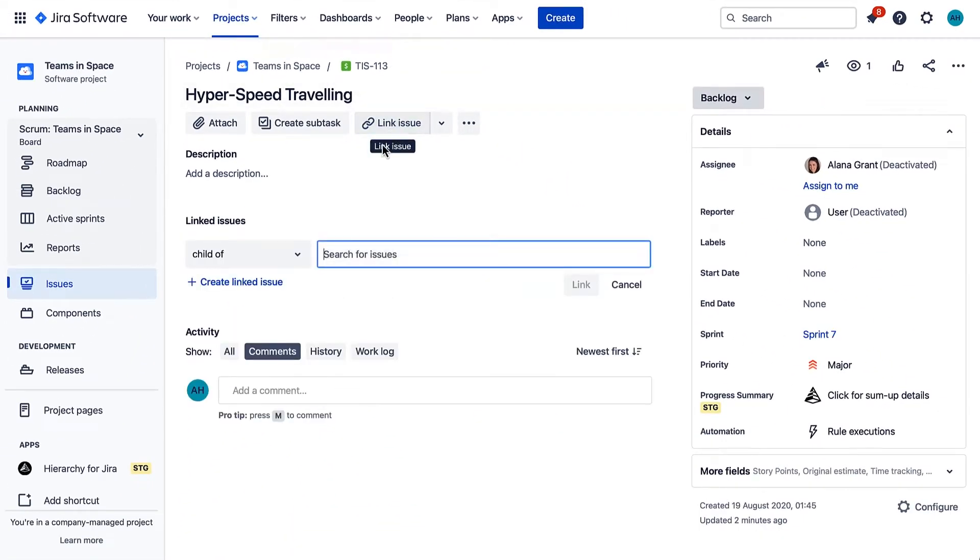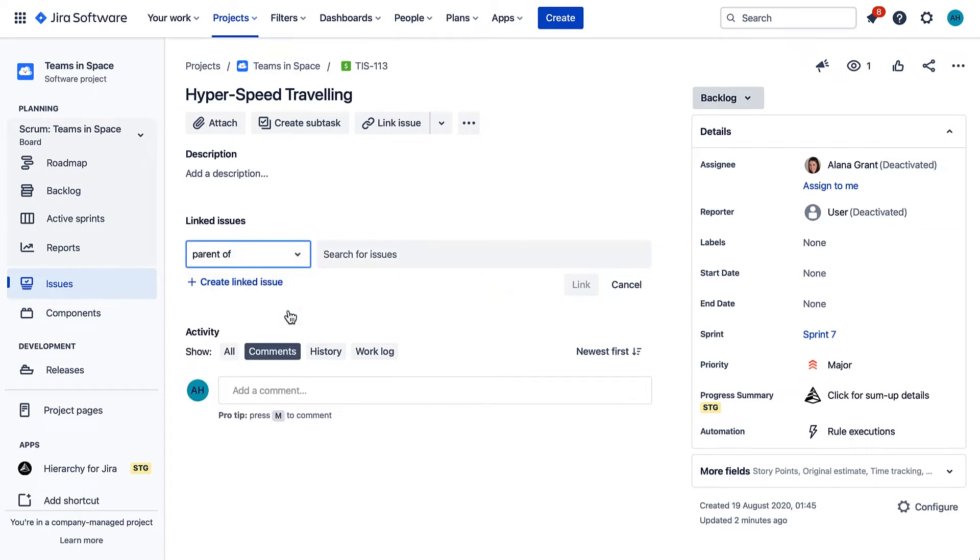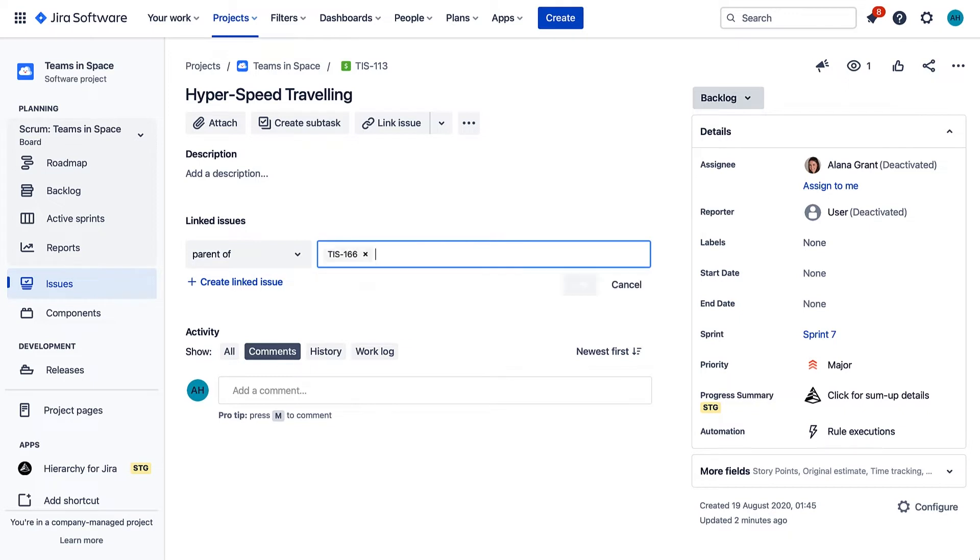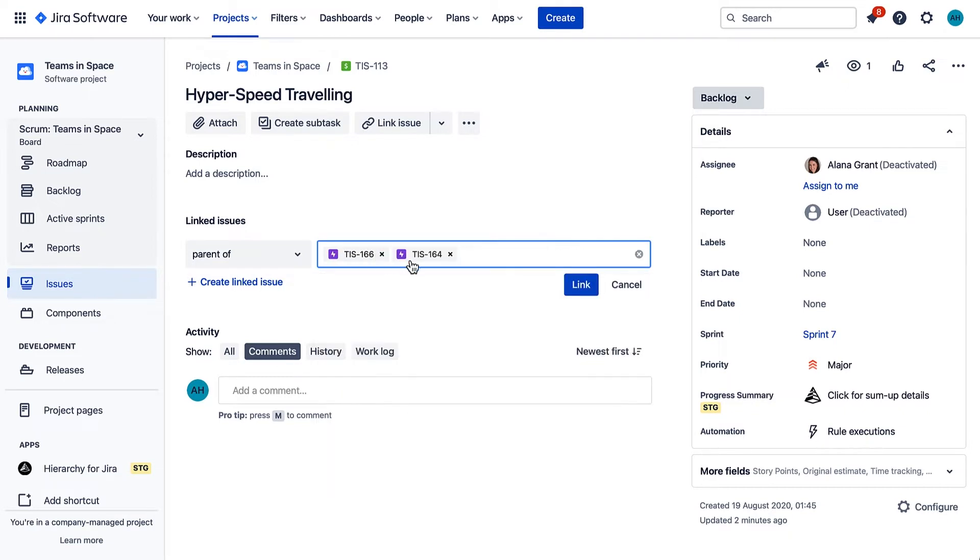Under Linked Issues, click the dropdown and select Parent Of. In the Search for Issues field, add the corresponding epics. Finally, click Link.